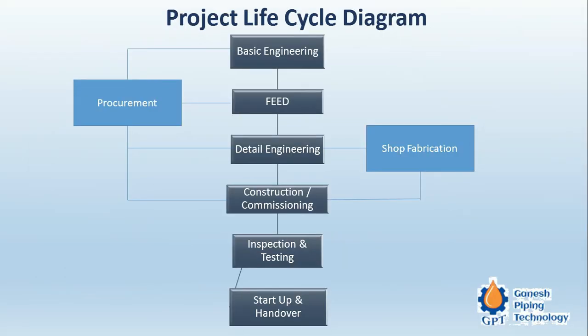Now we will focus on the project life cycle diagram. The first stage is basic engineering. During basic engineering, conceptual ideas are developed — for example, if we want to set up a gasoline plant, basic engineering covers the basic process, input and output quantities, process calculations, plant capacity, and how many trains there will be. All this information is identified during the basic engineering stage.